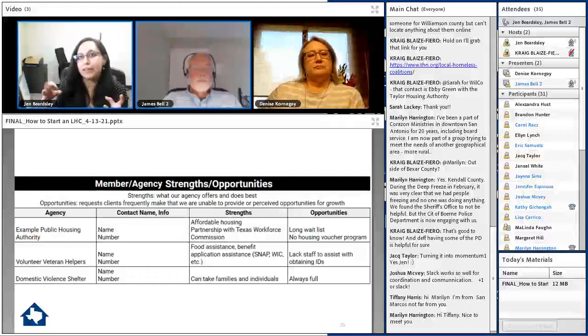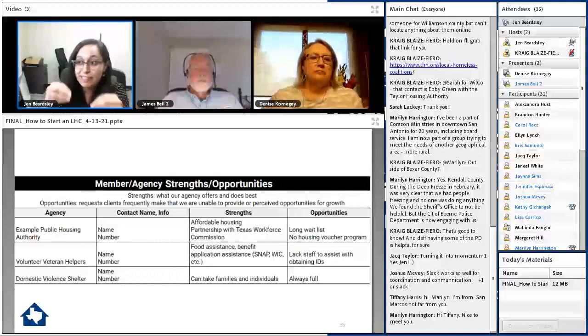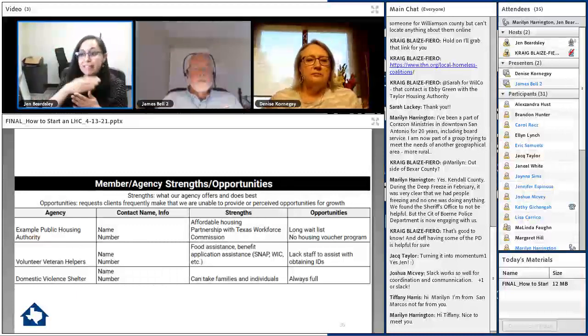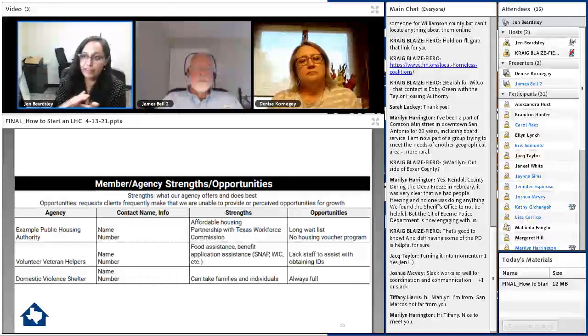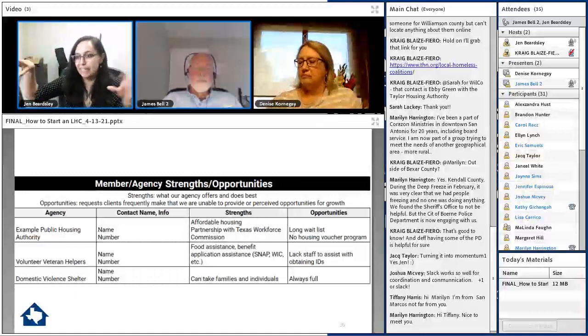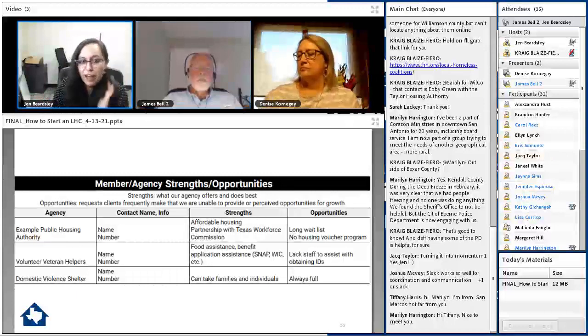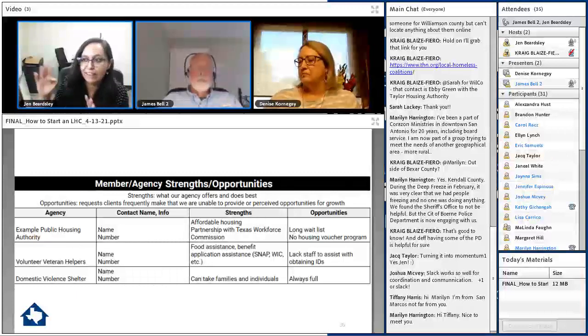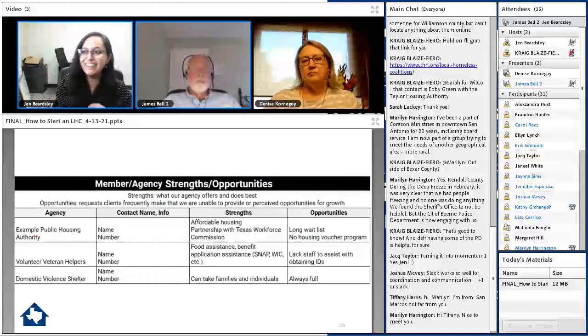And when there's an action item assigned to a member in the coalition, we recommend following up immediately after the meeting, or as soon as you can, with who is assigned what action item and the date they're going to report on the outcome. Then halfway between that meeting and the next one, reach out again and say, hey, in 2 weeks you are going to report on this action item. Were you able to get to it? Is there anything we can do to support you? And then a few days before, say, hey, don't forget, we have this action item we're going to talk about. Are you still able to talk about it at the meeting?